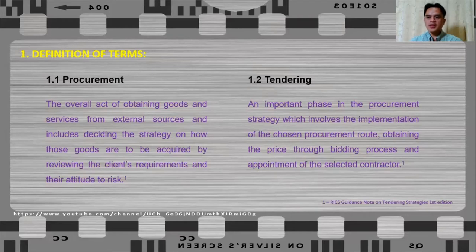So you see, tendering is only part of the procurement process, while procurement is the overall process of obtaining the goods. It may start from analysis of your client's requirement, analysis of the risk appetite, preparation of your procurement strategy, tendering process, all the way up to the delivery of goods or completion of the project for which you procured your contractor. That is why, do not interchange these two terms because they mean differently.